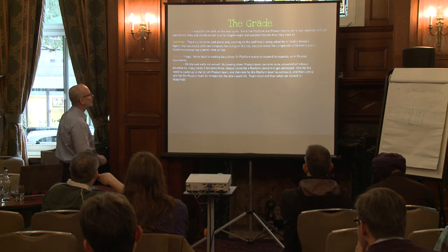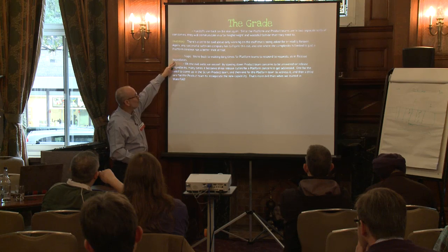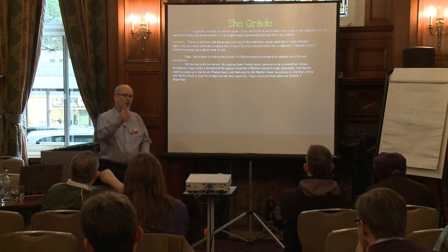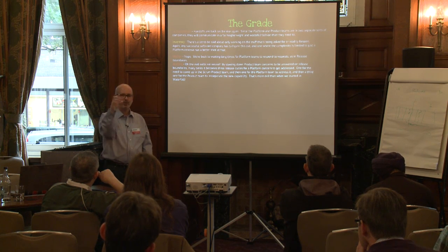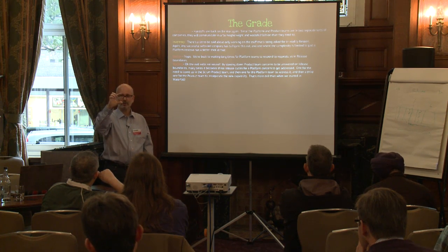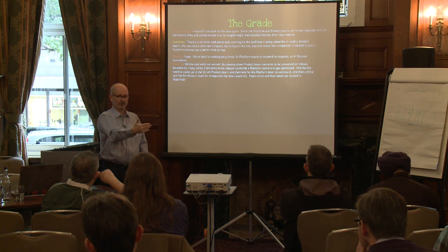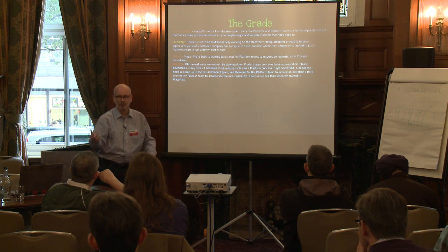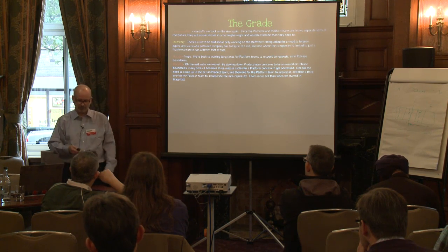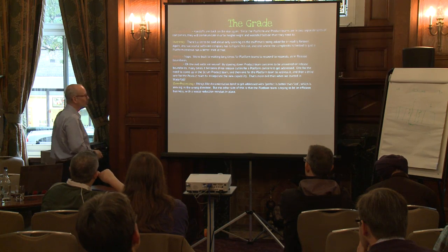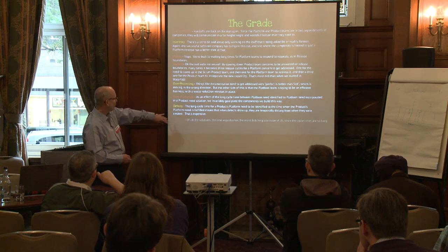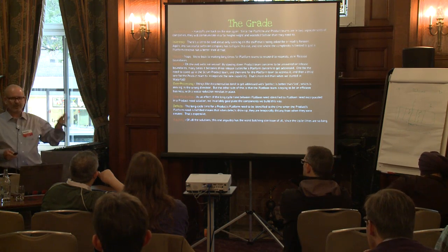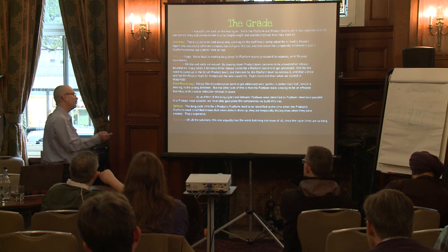Motion doesn't go away, we got large things. In fact, motion and waiting get worse, right? Because now we might start seeing a requirement come up in one release for a product that gets taken into the next planning cycle for the platform team, and a result doesn't come out until a third release from where we are. So it can get horrible. It can get worse than we started off with. Let me get past this. Okay, it seems like a great idea. Believe me, it's one of the worst ideas. But it's different thinking.